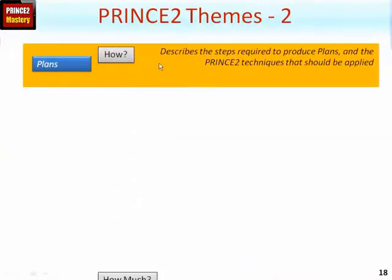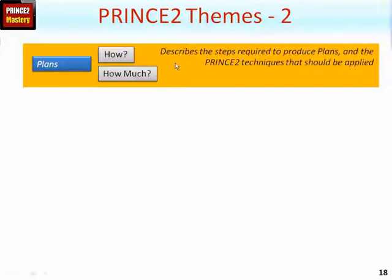The PLANS theme covers the HOW and HOW MUCH. This describes the steps needed to create a plan. In PRINCE2, all plans are a document. They will contain schematics such as Gantt charts, product breakdown structure diagrams, and so on, but they will also contain narrative which lays out how the plan is to be used and the PRINCE2 techniques that should be applied. A plan also contains HOW MUCH — how much cost, how much resource, how much time, as an example.